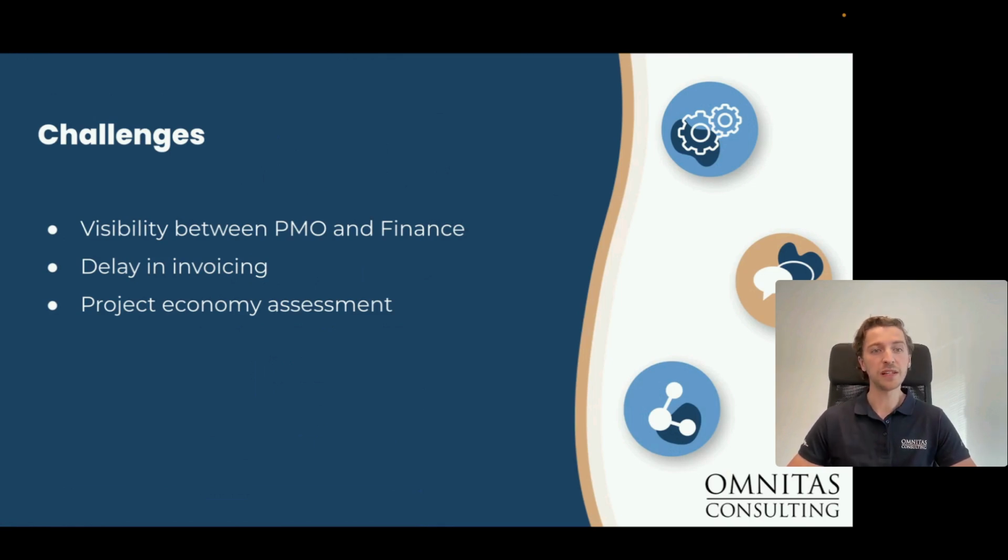And then finally is doing the project economy assessment. What I mean by this is, if we have this information readily available, meaning what have we sent to our client, so money in terms of client-facing invoices, and what have we spent on this project, both in terms of internal resources, for example, if we count our internal resources through time reporting or such, but also the supplier invoices that are tied to our project.